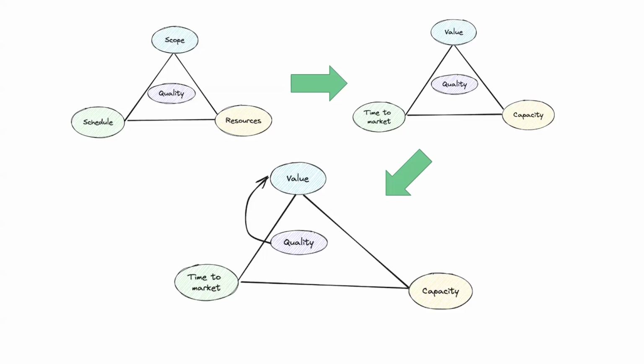Capacity is not like that, right? If you actually post an ad, try and find some people, start a negotiation with a partner about using some of their people, whatever it is, you're probably talking about 3 months before they're actually in the seat. It will probably take them 3 months to start fitting in with the team and really getting up to speed, understanding what they're doing, all working together nicely. We're now 6 months in.